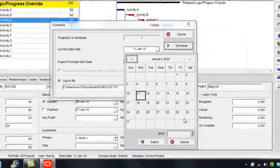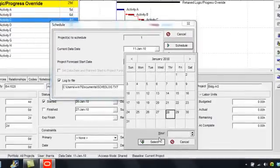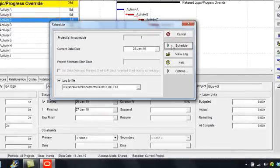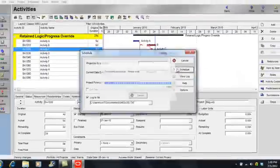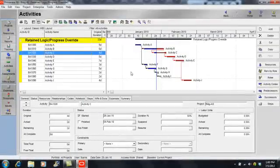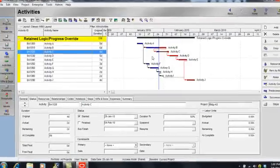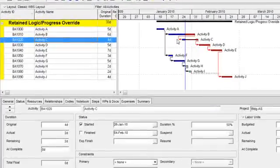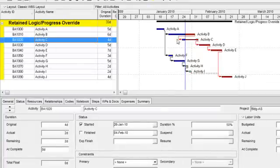And I'll click Schedule. As I can see, when scheduling using retained logic, the activity that starts out of sequence cannot complete until its predecessor has finished.